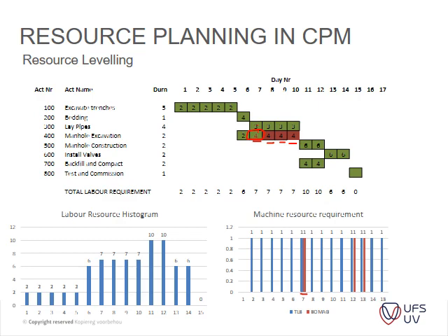So what basically happened was we took away the 1 TLB on this 1 day, and we added 4 laborers per day to this item, for 4 days, so our labor increased to 7 on these days.